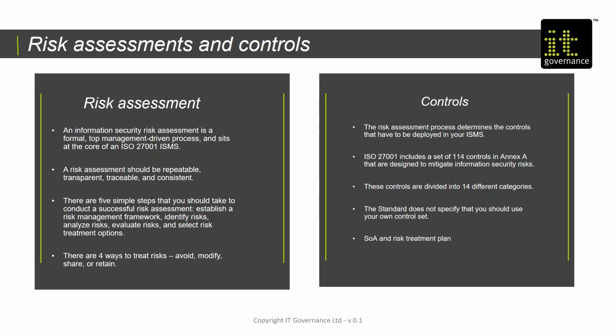And risk treatment options are the 4 standard options: to avoid the risk, to modify it by applying a control, to share the risk with a third party through insurance, or to retain the risk. In other words, to do nothing about it, just to put up with it.